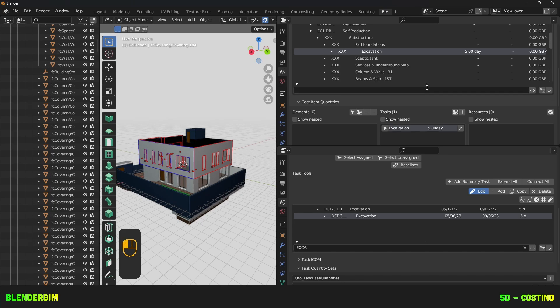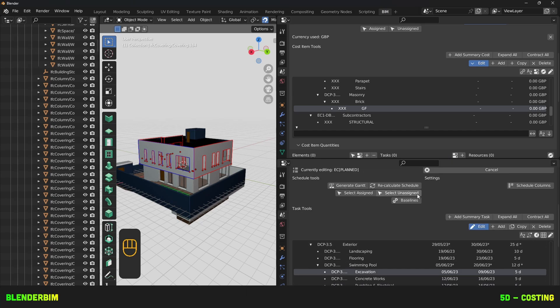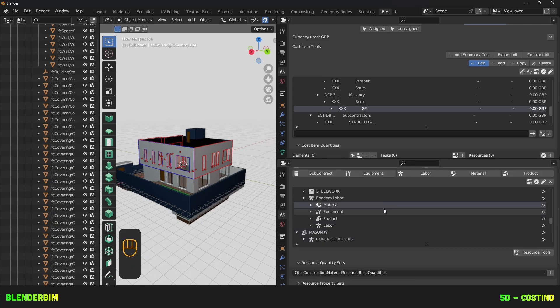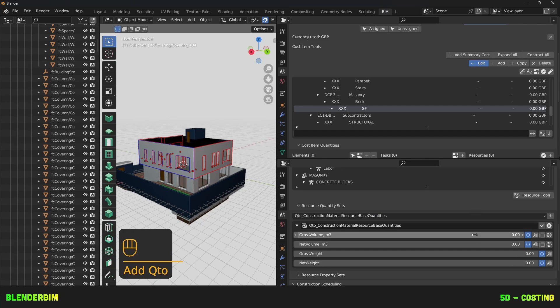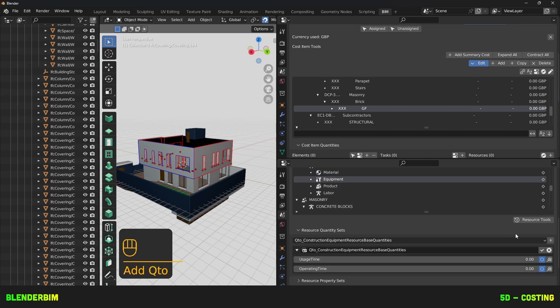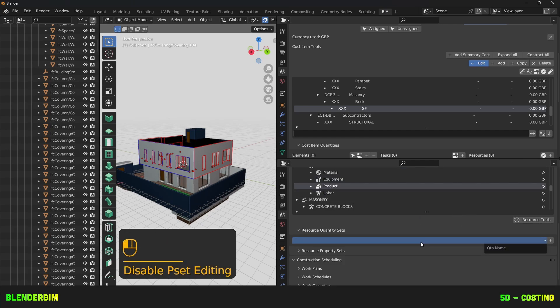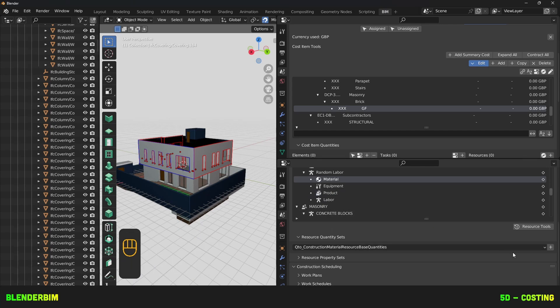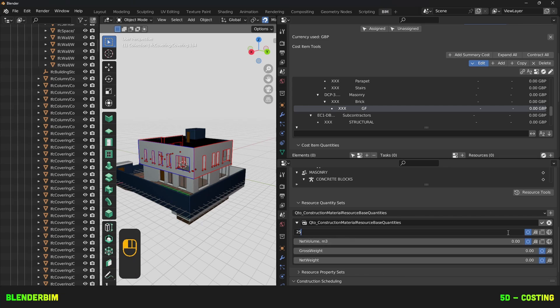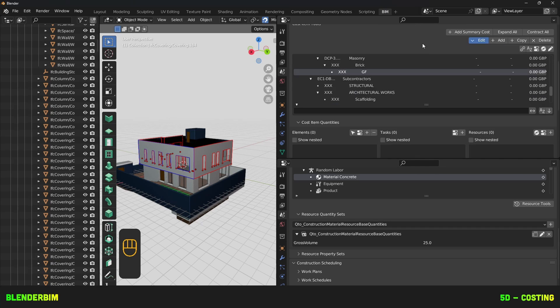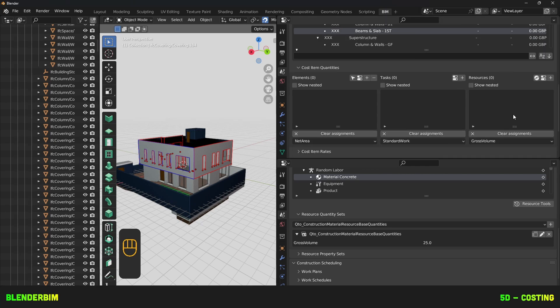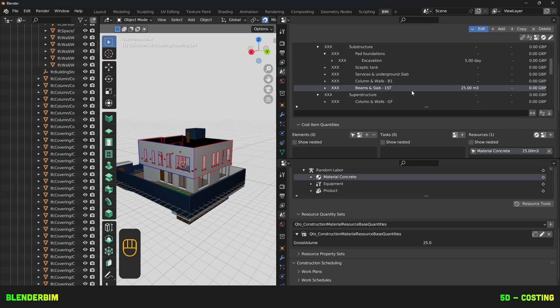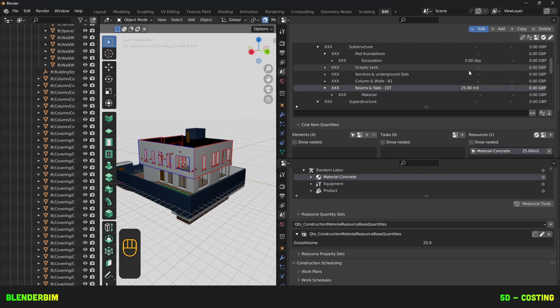We can also get quantities from resources. Let's now look for a resource. So we'll go to our resources panel. I have four types of resources here. Material. So I can add a construction material resource. We have an equipment QTO. Then we have labor base quantities. And product does not have any QTO. We're just doing a material resource base quantity. And we're gonna look at this in volume. So 25 cubic meters of concrete. Now with this resource selected, I need to also select the cost item back here. So I'm gonna assign this resource. And I'll use its gross volume. And there we go. We now have 25 cubic meters there. Technically you should have something for materials and labor and equipment separately.